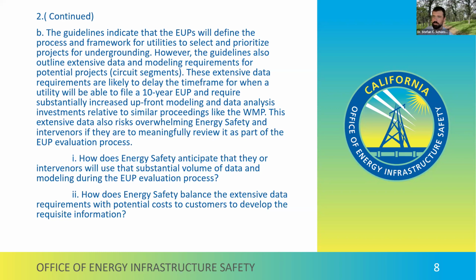If I may speak to the ablation study. Certainly. One of the core requirements, so we've heard in this discussion and in our previous data requests and WMP filings, is that risk analysis happens at the circuit level. A key component of the legislation is the collective analysis. The word collective is used several times in this context in the legislation. And so in order to do that, you have to add up, although we understand it may be nonlinear addition, there may be dependent effects that have to be modeled, but you have to add up these project level risk analyses. To do a portfolio versus doing an ablation is the exact same process, just with one fewer project to add up.